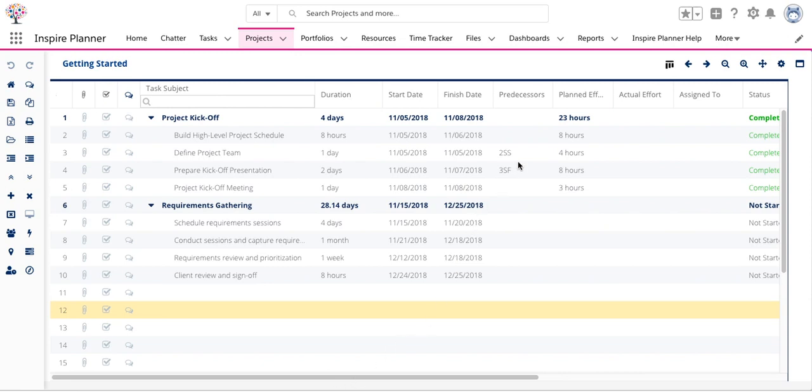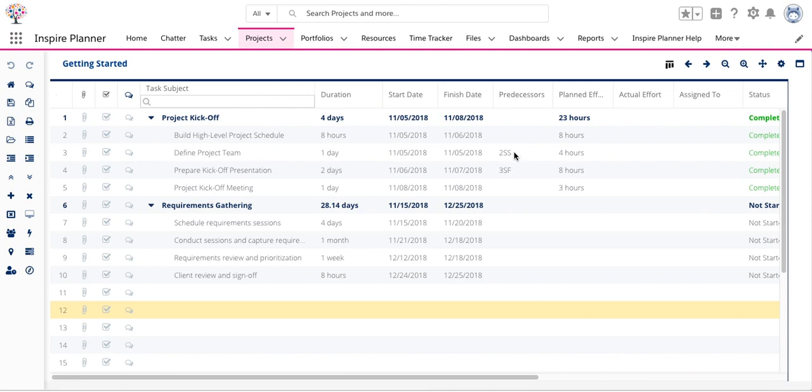In this project we have two predecessors set. For the task in row 3, our predecessor is row 2, that task, and then the type of relationship is start to start, so that's why we see that code SS.